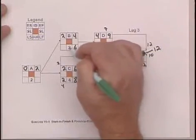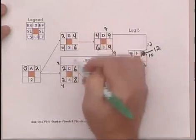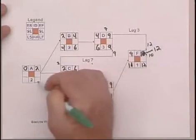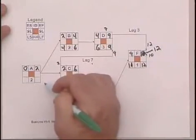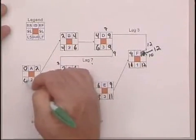Here it's simply six. Two minus six is four. We have our choice of four or two for the late finish for activity A. Choose the smaller number, two. Two minus two is zero.